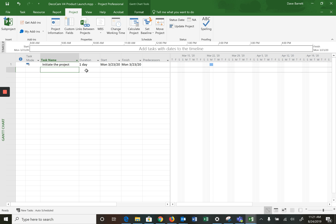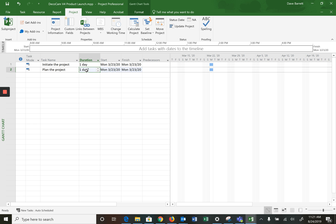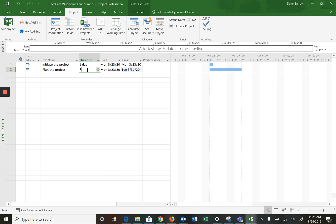The next one is 'Plan the project'. You can see it also assumes one day. In this case, planning the project — based on duration estimating from the textbook — is planned to be seven days. So we can go like that or just put a seven in. Either way will work.